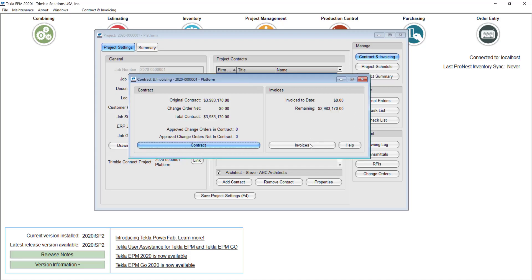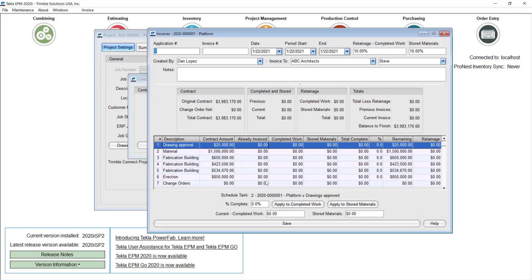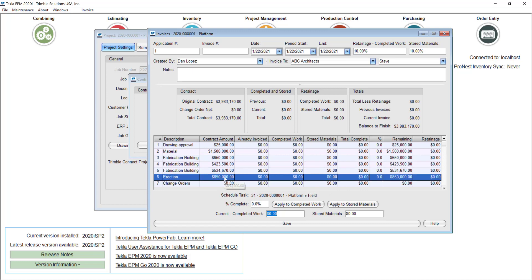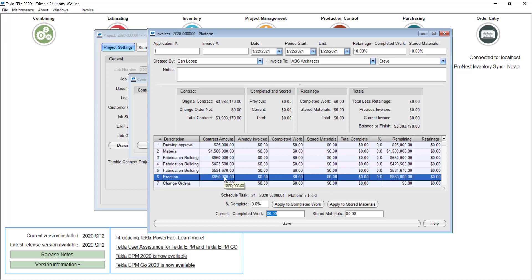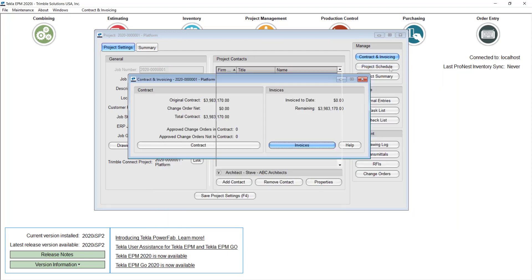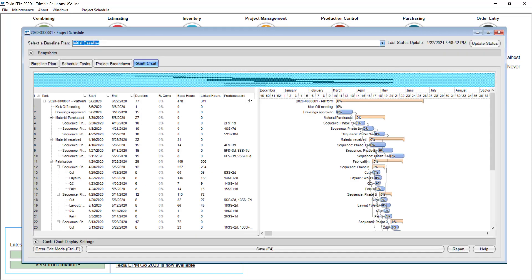Now if I go to the invoices screen and click new, you will see that the percentage suggested is pretty much 0% for every task. That's because I have not updated my schedule yet. Let me go back and show you the project schedule or Gantt chart for this project.